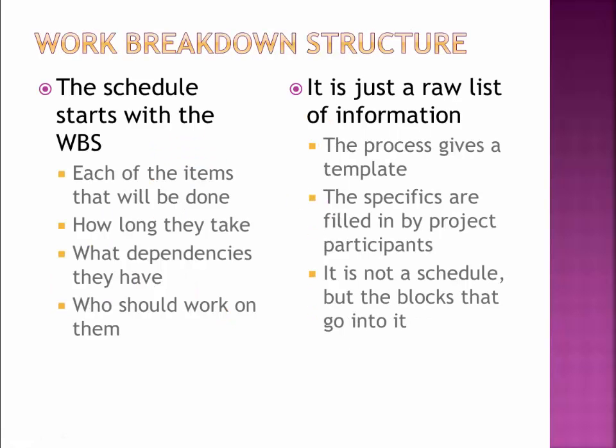So the WBS, the work breakdown structure, is a list of each of the things that's going to be done on the project. If you're going to make a schedule, it shows up in the work breakdown structure. If you're going to write requirements, it shows up there. If you're going to write test cases or unit tests, they go there. If you make functional tests, they go there. You're writing some code, you're implementing every little task, and you want them to be as granular as possible.